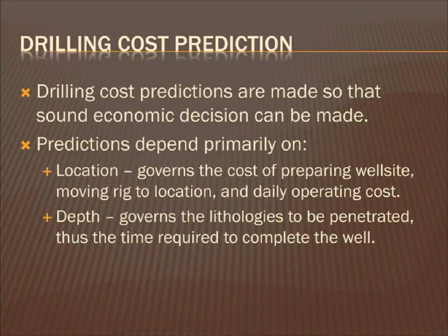Cost predictions are an integral part of our company's services, designed to assist with making beneficial financial choices. Factors such as location and depth are taken into consideration when making these predictions, as they can influence the cost of preparing the well site, moving the rig to the preferred spot and daily operations. Furthermore, the varying lithologies penetrated depending on depth can have a bearing on the time taken to complete the well.